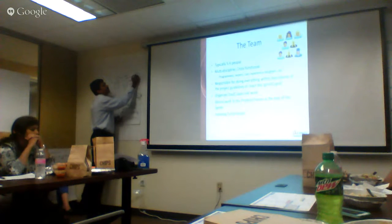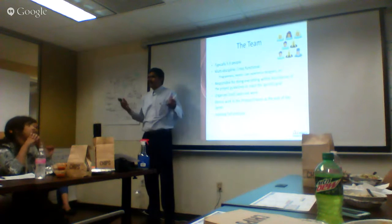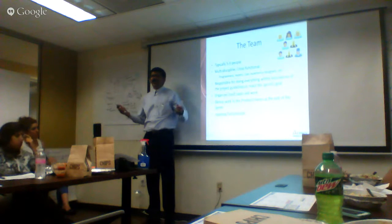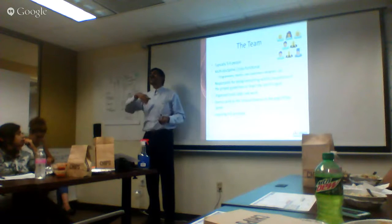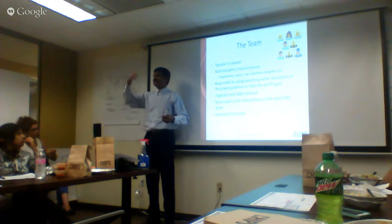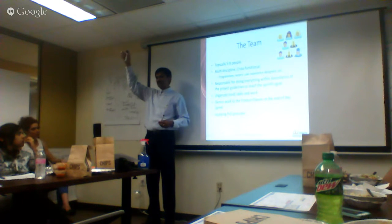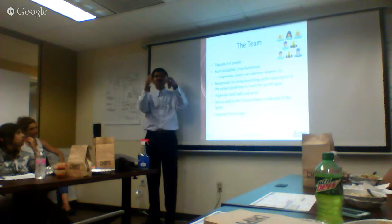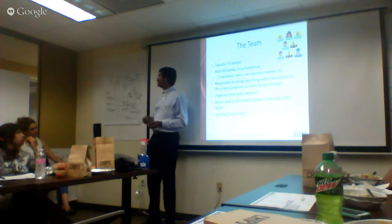Like action items. This is a user story. Let me give an example. As a user, I want a login feature to my product so that I have security on my website. That's my user story. In the traditional way, the requirement was: the system shall contain the login feature. So who is the subject? In that, the system; here, the user. So everything is geared to the users, and we get acceptance quickly when we target the user story.